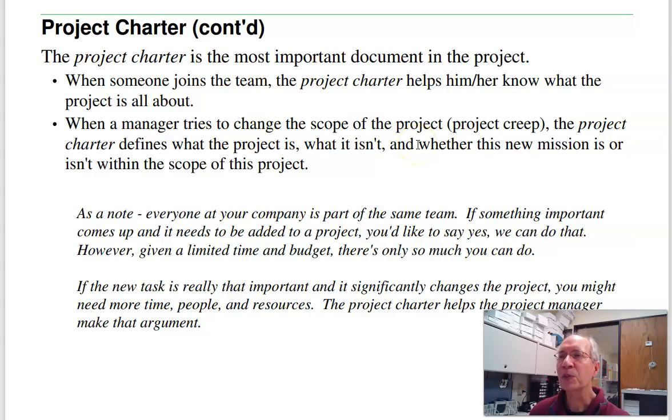Again, the project charter is probably the most important document in the whole project. When a manager tries to change the scope of the project, meaning project creep, the project charter is what defines what the project is and what it isn't. If the scope is changing, it's a new project.